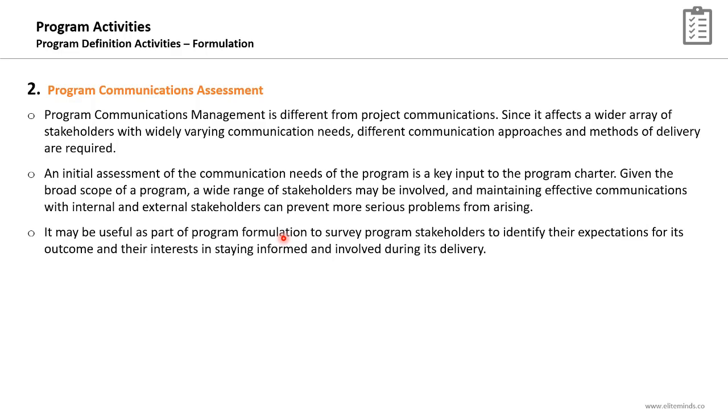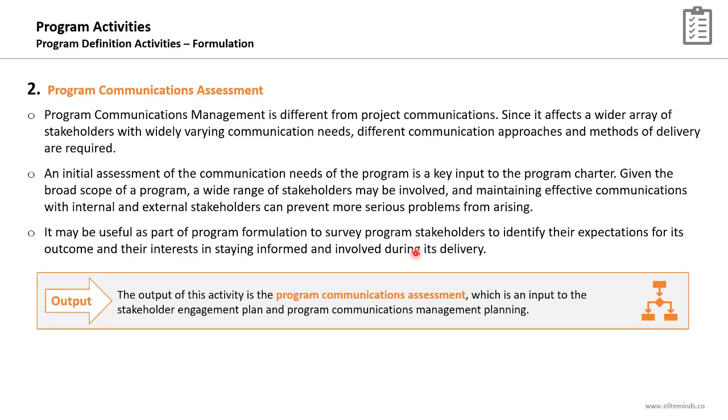It may be useful as part of the program formulation to survey program stakeholders to identify their expectations for its outcome and their interests in staying informed and involved during its delivery. So there is a very strong link between stakeholder management and engagement and communications requirements and needs identification. So it will be a good idea to survey the identified program stakeholders to know their expectations and communication needs.